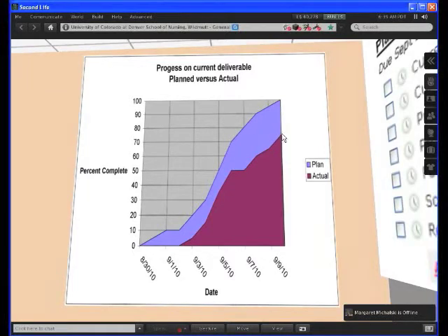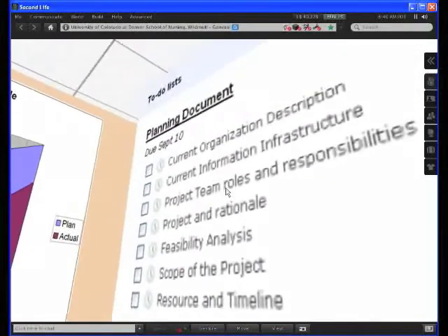So here it looks like a lot of work was done. The net result was only 75% of what needed to get done. And the biggest problem was way over on the left there. Things didn't start early enough. The rate of work was fine, but several days were lost getting started.